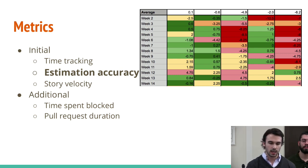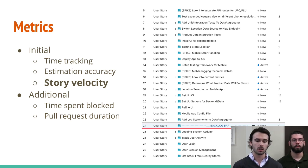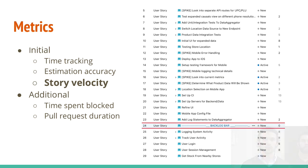And then going along with that, we've also been tracking our story velocity. And this really helped us. As you can see here, we have a backlog bar. So we've really been going over this a lot with our sponsors, saying this is where we know we're going to get to. Is there anything below this bar that you think we should prioritize above it? And is there anything above it that you think maybe should be swapped out for something below it?